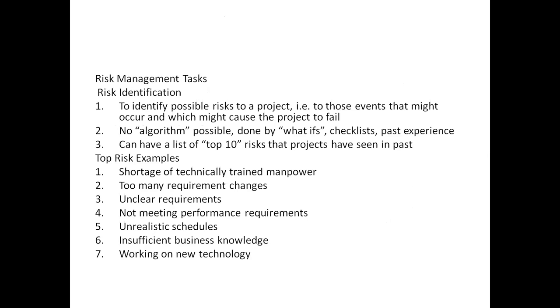Risk assessment. What is the goal of risk assessment? The goal is to prioritize the risks so that the attention and the resources can be focused on the more risky items. Out of the given risks, you have to prioritize them. Risk assessment involves three steps, namely risk identification, risk analysis, and risk prioritization.